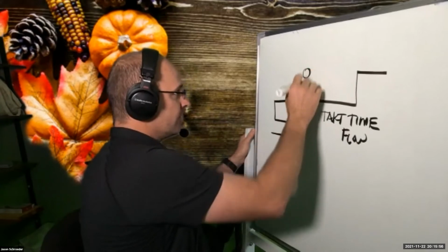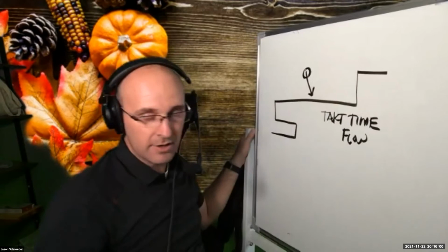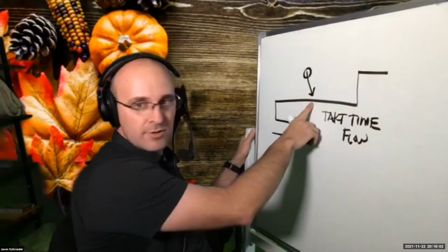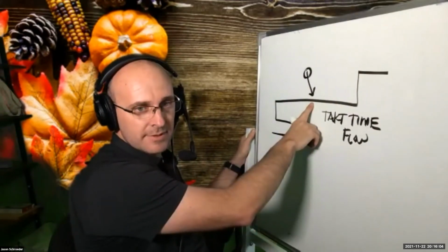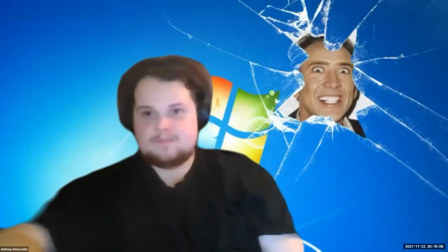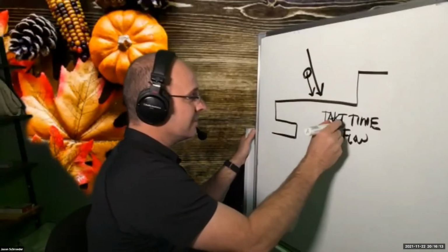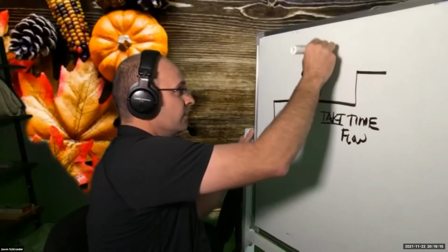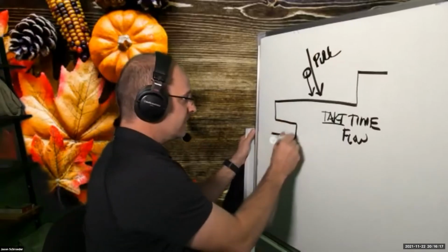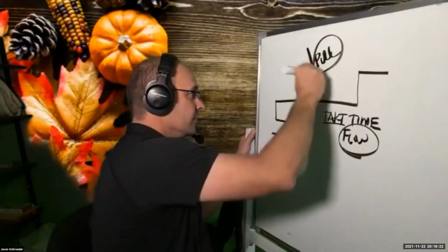So if there's a motor that has to come into this assembly line for the car, do they assemble the motor right here on the line? Yes or no? Somebody tell me. No. They pre-assemble it and they pull it to the line, to the takted line, and that is what is pull. So the main line flows and all of the other items pull.